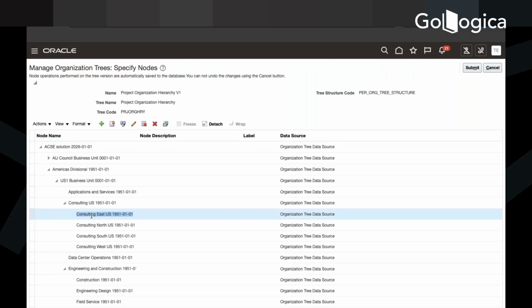That's how it looks into the BU: what is the expenditure organization with that cost? Depending upon that expenditure organization, it will go to the burden schedule. It will check that this expenditure organization is part of this hierarchy, and what the multiplier is over there, and it will add it to the original cost.